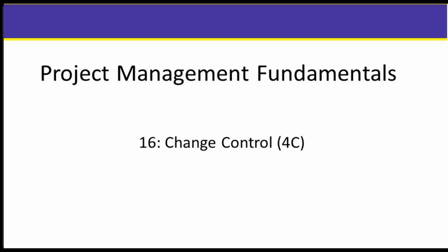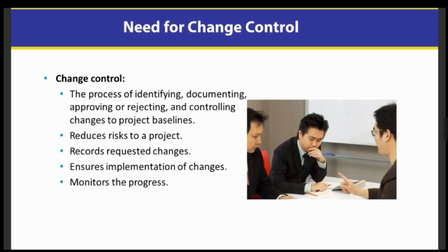I have an IT background, so I throw everything into an Excel spreadsheet, right? So I will have an Excel spreadsheet where I'll say what the change is, what we think it's going to cost, how long it's going to take, who wants it, and then we'll rate that. And sometimes we're able to do it and sometimes we're not. But the great thing about doing it that way is that it might be fodder for a next version. Okay, sure, yeah. So I can use that for later.